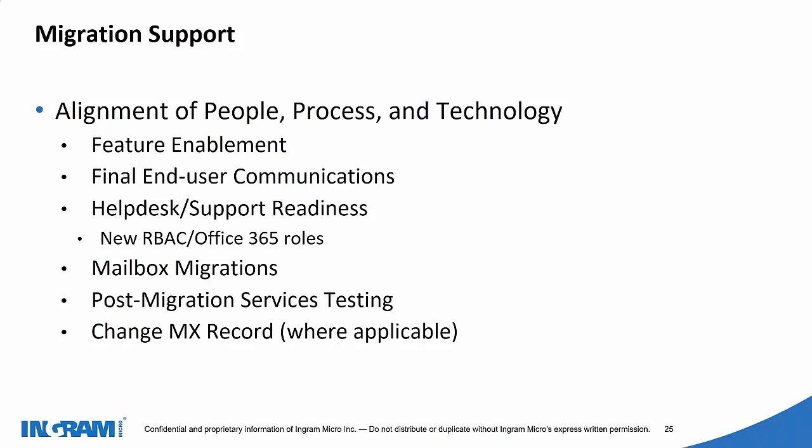And please do it, it's necessary, in fact it's beyond mandatory to do the post-migration services testing, because if you don't do these tests, and if your customer has any issue afterwards, it will be a nightmare for you. After that, when everything is done, do the cutover, not necessarily changing the MX record, basically do the cutover action from the old infrastructure to the continuation in Office 365.